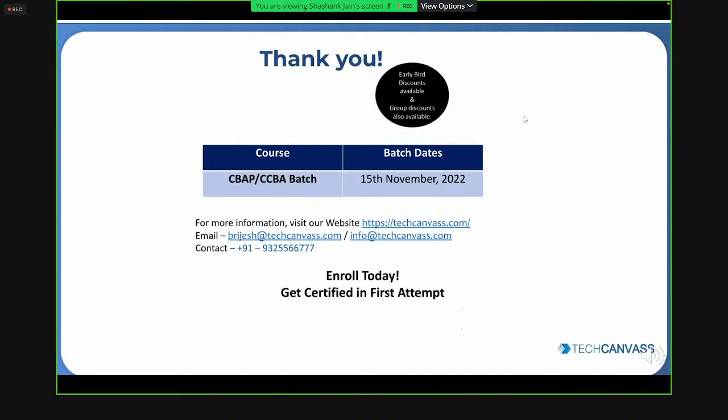There may be some stakeholders which you will find that they are less influential and they have less impact as well, but it doesn't mean that you simply ignore them. You still have to monitor such stakeholders so that their interest or influence do not change. You can also prepare the RACI matrix as well to define which stakeholders are responsible, accountable, consulted, and informed.